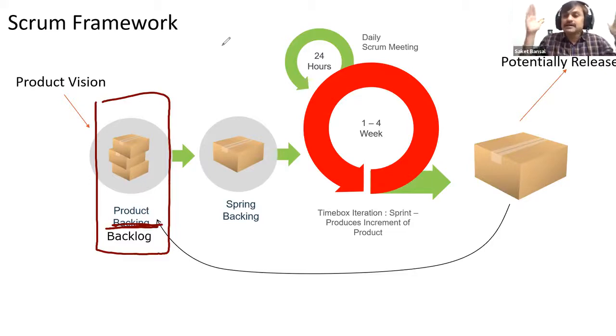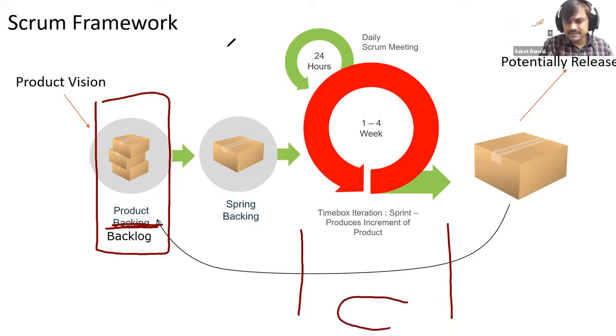So we identify a time box, and a time box could be 1 to 4 weeks. We say, my team is sitting here, this is the capacity we have, and tell me out of your ever-growing product backlog what elements you want us to finish in this sprint, this time box, say in the next 2 weeks. They will say, do it all. We say, no, we can't do it all, we can only do this much. Now tell me which one you want.